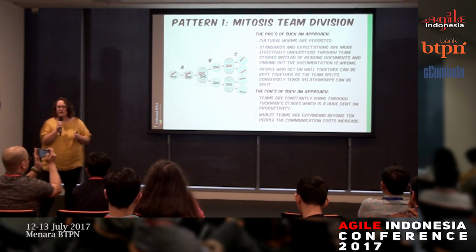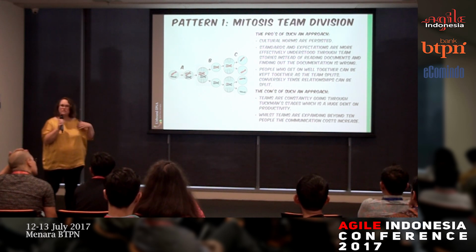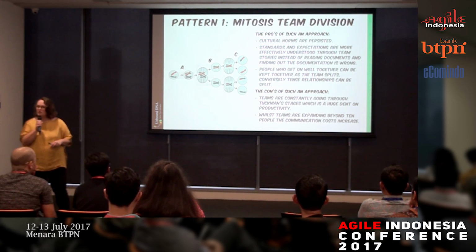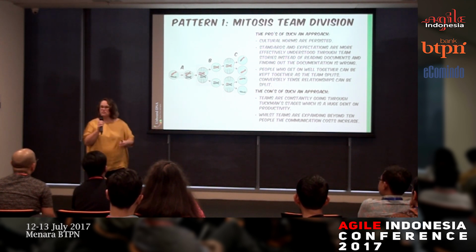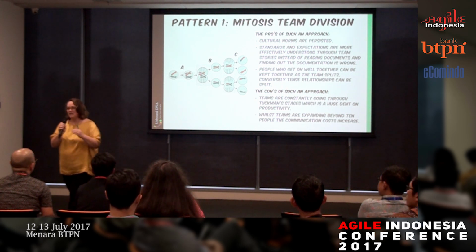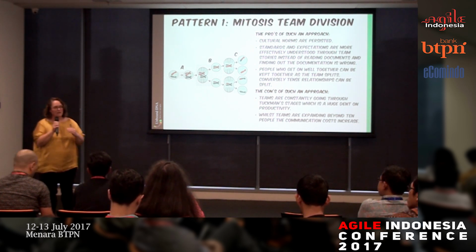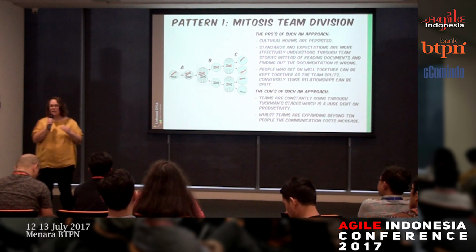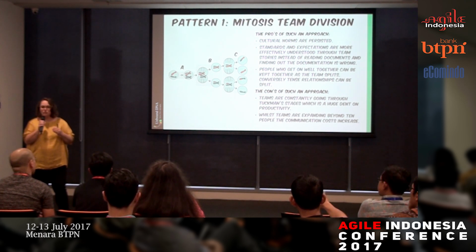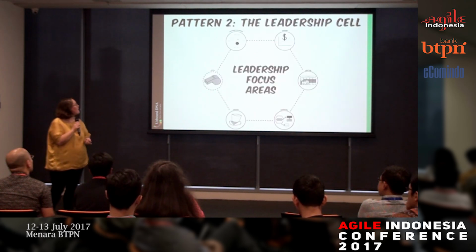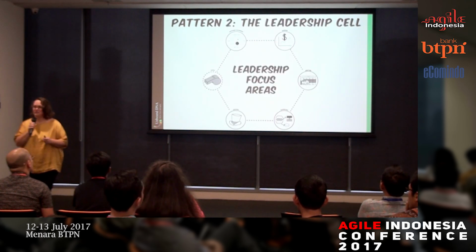There are many other pros, but I would like to highlight the cons. So it's not all about the benefits. I'm going to give you some bad things about these patterns as well. Teams are constantly going through change. Tuckman's model talks about forming, norming, storming, performing. If you're constantly adding team members, which you would be in this pattern, you're constantly going through Tuckman's model, which means you're never going to reach performing until you're done. But you've got the risk anyway, no matter which approach you take. So that was the simplest pattern, MITOSIS.